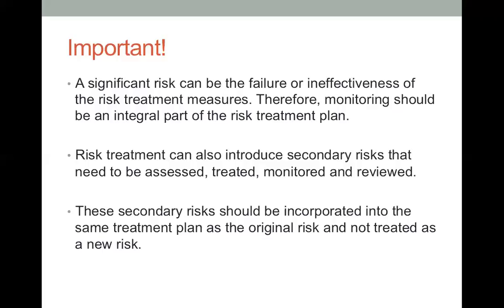These secondary risks should be incorporated into the same treatment plan as the original risk and not treated as new risk. So when we treat the risk, we may find a new risk coming as part of the secondary risk. We have to treat it as part of the same treatment. We'll have consistency if we do that, so we are not going to treat that as a new risk.